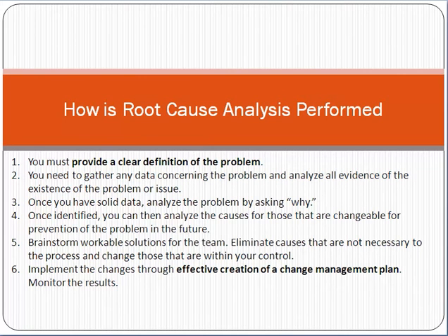So friend, what is the approach for root cause analysis? First of all, the problem should be clear in your mind. Then gather the data concerning the problem. Once you have the solid data, analyze the problem by asking why. Same question, why. Why was the project not delivered on time, why were resources not available, why were the alternate solutions not identified, why has the development team missed the scope, etc. So you should have the ability to ask the questions why.